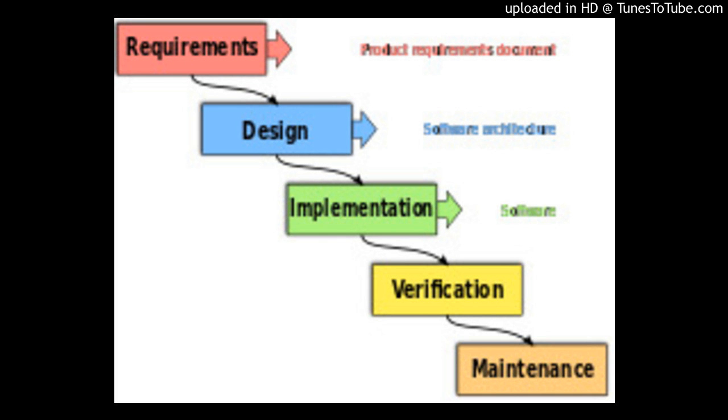Rapid application development. Rapid application development, RAD, is a software development methodology which favors iterative development and the rapid construction of prototypes instead of large amounts of upfront planning. The planning of software developed using RAD is interleaved with writing the software itself. The lack of extensive pre-planning generally allows software to be written much faster, and makes it easier to change requirements.